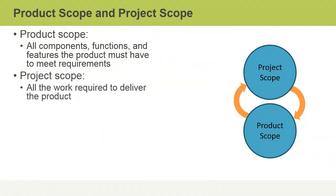Project Scope is the work required to deliver the product, so Project Scope is based on Product Scope. If new features are added to the product, it impacts Product Scope as well as increases Project Scope. At the same time, if the project budget is cut, you may need to decrease quality or amount of work completed, which will impact Product Scope. So you see how Product Scope and Project Scope are different, yet very closely related and intertwined.